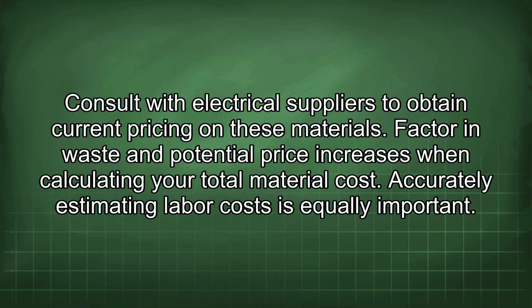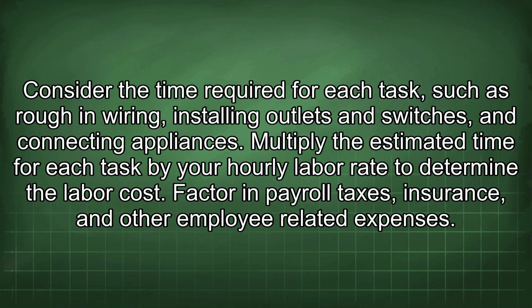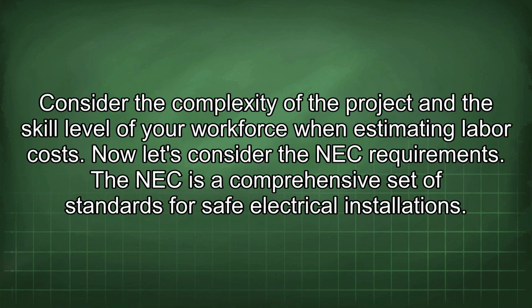Accurately estimating labor costs is equally important. Consider the time required for each task, such as rough-in wiring, installing outlets and switches, and connecting appliances. Multiply the estimated time for each task by your hourly labor rate to determine the labor cost. Factor in payroll taxes, insurance, and other employee-related expenses. Consider the complexity of the project and the skill level of your workforce when estimating labor costs.